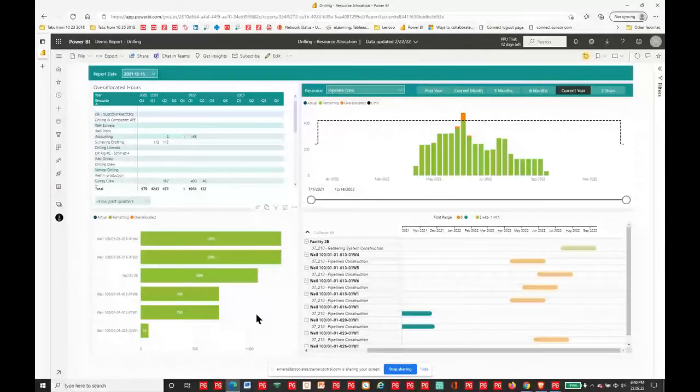One of the things that a lot of people tell me that they're concerned about when they're running reports from P6 is that if you're working on a project where they're doing rolling updates, it can be an issue if you don't get the report right at the right time. Somebody's gone in and put another update in there. You may end up in a little bit of a rocky scenario there.